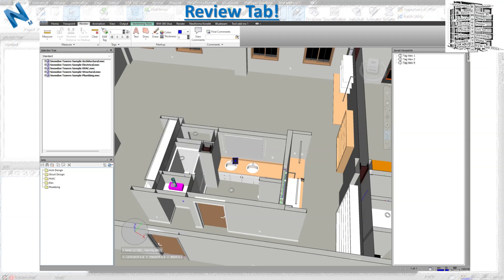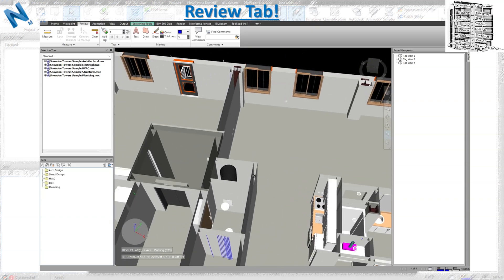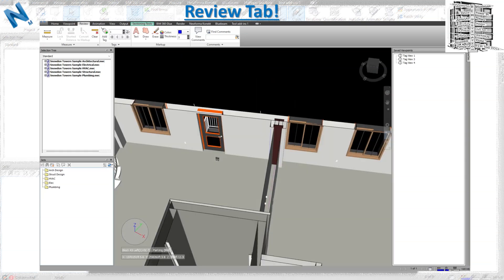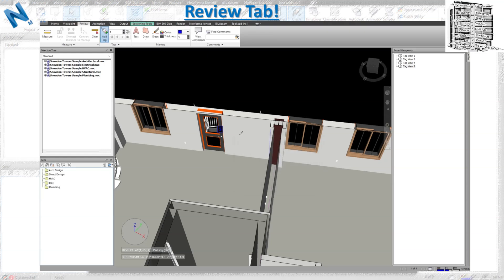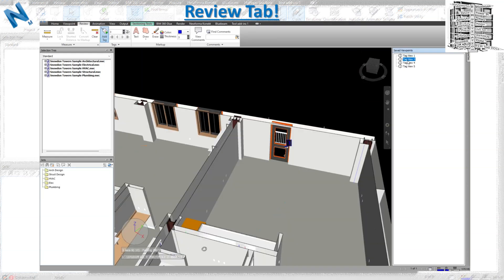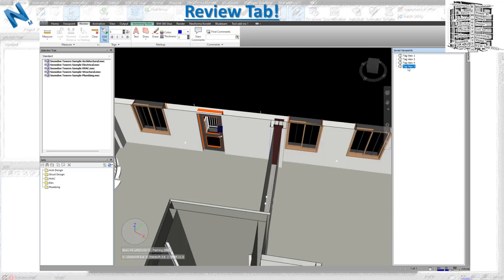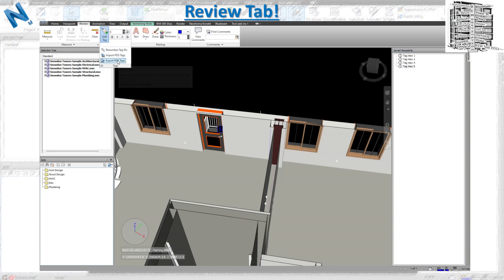You can create additional tags in other areas as well. This is a really good item for the punch list — you can create your punch list here and publish it as an NWD file, send it to the relevant sub or trade, and they can go through the viewpoints, see the comments, change the status, and navigate through. Clicking on each tag takes you directly to that location in the model.